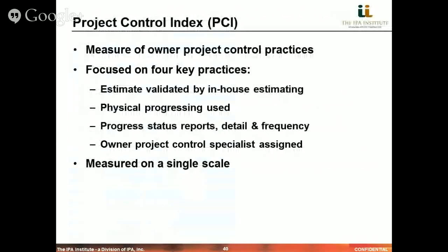It's a measure of an owner's project control practices at a very high level, touching on four key practices: the estimate validation by in-house estimating, the extent to which physical progressing is used, the level of detail and frequency of status reports, and then finally, at the most fundamental level, does the owner have a project controls specialist assigned to the project?